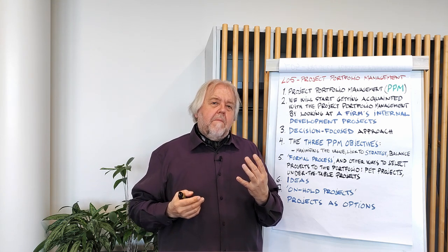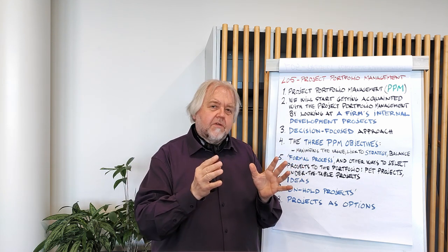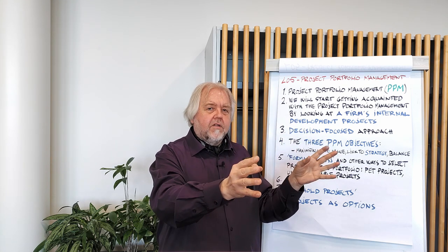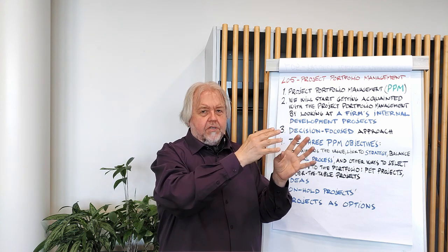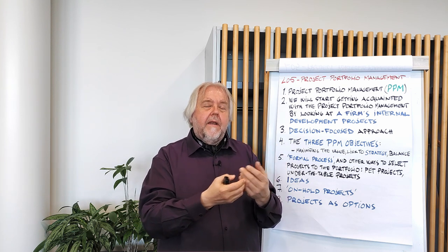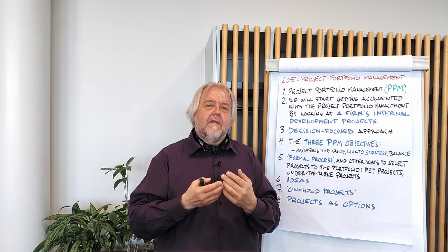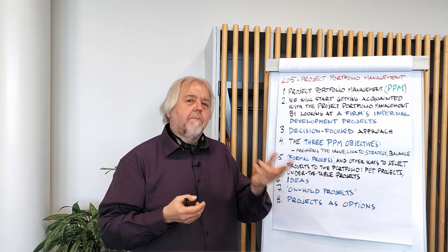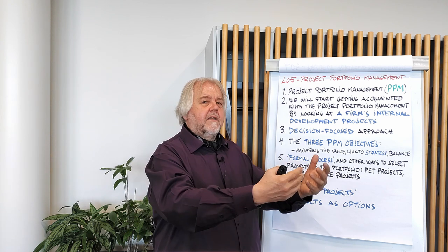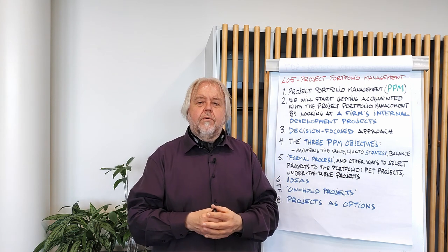So maybe we should start two or three different new product development projects which all use different potential future technologies. And whichever technology happens to become the dominant one, then we have been already prepared for that, because we have options for each of those technologies, and projects are the options that we have invested in to be prepared for whatever future would come true.